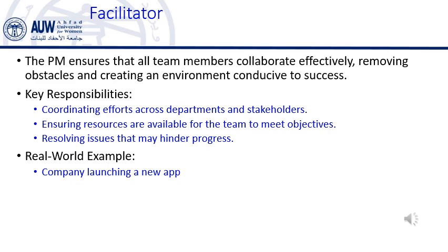Imagine a company launching a new app. The team is made up of designers, developers, marketing experts, and customer service representatives. The design team faces delays in finalizing the user interface, and the marketing team needs the final design to prepare promotional materials. The project manager, in their facilitator role, communicates with both teams to understand the problem, reallocates resources to support the design team, and adjusts the marketing team's timeline.